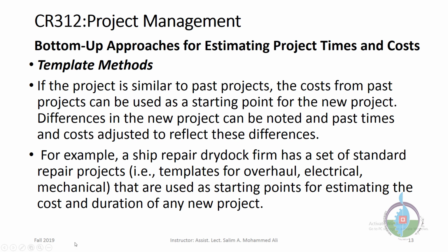For example, a ship repair dry dock firm has a set of standard repairs. If a ship comes with an engine fault or a mechanical fault, they have a template for that. Or if it has electrical faults, they have a template for electrical repairs, etc. So they have templates for each type of fault that are used as a starting point for estimating the cost and duration for any project.